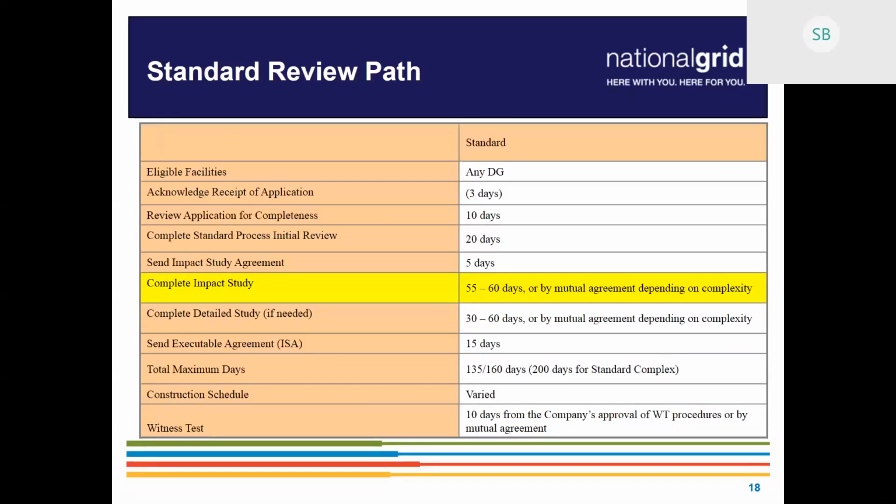There is a process the ISO moves through that takes 4 to 6 weeks. So depending on when that information is available and when it's submitted, we may have to put the project on hold if we don't have a determination from the ISO, or if the determination comes back saying we do need further analysis or study. So it will happen during impact study, as early in impact study as we possibly can. But there is information we would need as part of that back and forth to be able to fill out that GNF to send off to the ISO.